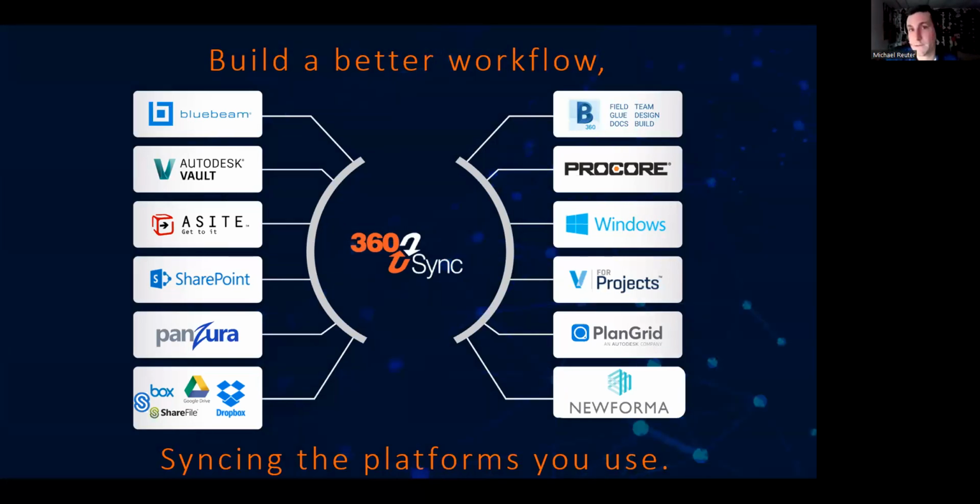Let's say that the architect uses Newforma. If that's the case, then that general contractor is going to have to log into Newforma, type in all the RFI response information that he just put into his own Procore system, and upload the zip file that has the drawings and markups inside of it, as well as your PDF that has all the pertinent information: the question, the suggestion, the RFI number, the RFI name, all that fun stuff.